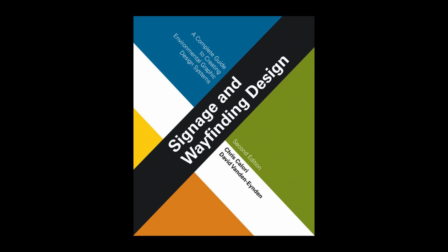This is typically the responsibility of the sign fabricator, but some clients want signs to be engineered as part of the design documentation. In these cases, the EGD firm will need to engage the services of a licensed professional engineer.